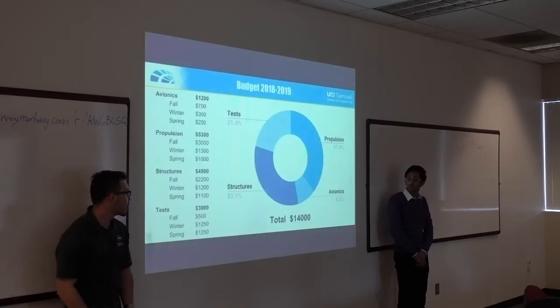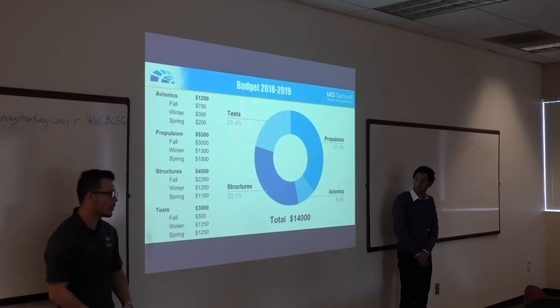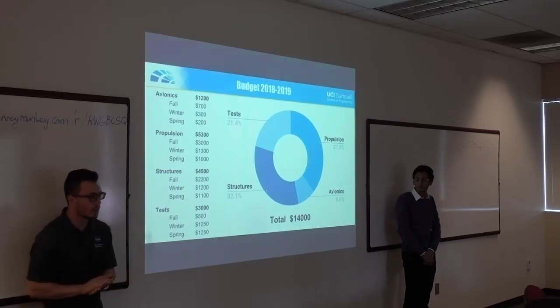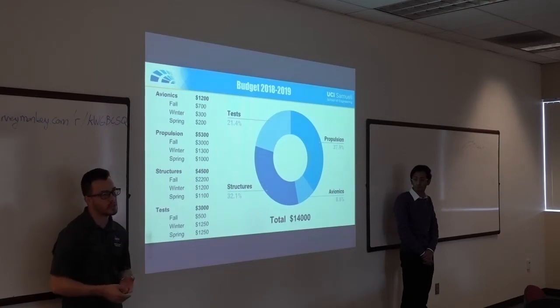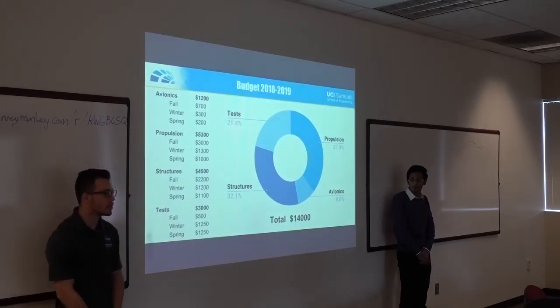So for our budget, here's our current breakdown. Up to date, through fall, we have spent about $5,000 to $6,000. This breaks down our budget for each sub-team, as well as the tests that we're going to conduct. Some of the tests include a cold flow test, which, after the injector's manufactured, determines how uniform our flow is. For cryogenic compatibility, we'll be using liquid nitrogen to test our subsystems to make sure there's no leaking and no cryogenic shock, as well as a pressurized cryogenic test.